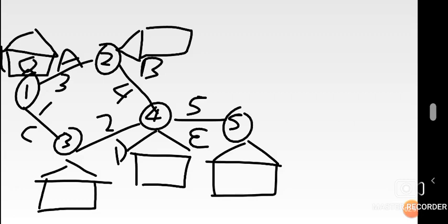On node 2, what would be the earliest start time? You follow the duration on that arc from point 1 to point 2. What's the duration? There's a 3, meaning the start time of that other one will be 3. That's how we just test, if anything. So in the box, we just put the start time, and in that triangular shape, we put the latest completion time, which I'll explain very soon.